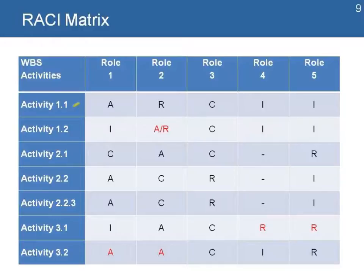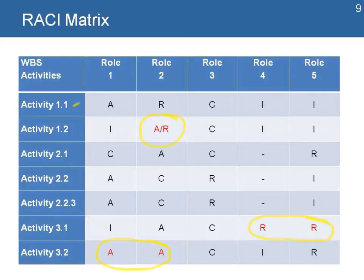Make sure to avoid common mistakes, such as one person being assigned both the accountable and responsible roles, two people sharing the accountability role for the same activity, or two people sharing the responsibility role. This matrix is also helpful for the team as it helps them understand and identify the owners for each activity, so people are clear about who is responsible and are able to report on the progress of those activities to the project manager.